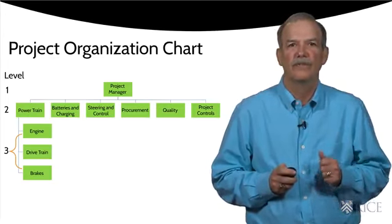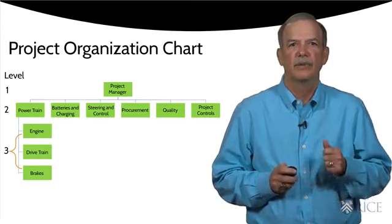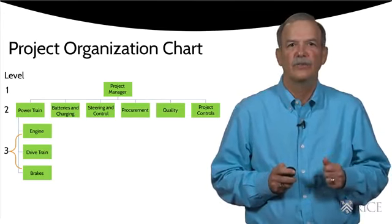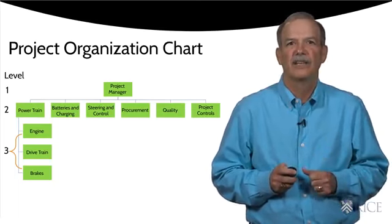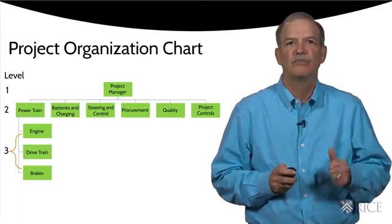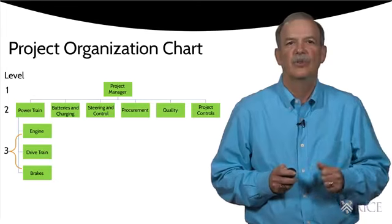Remember, one rule of thumb is to set up your project organization so that each function or section can be set up like a mini project and can have its own scope, schedule, and budget. This drives accountability.